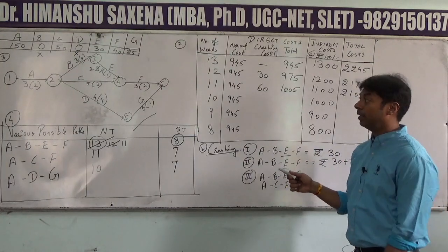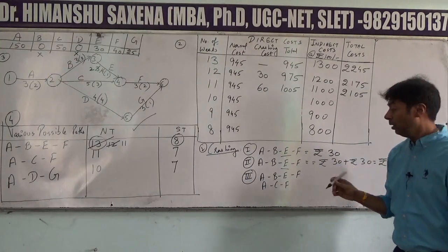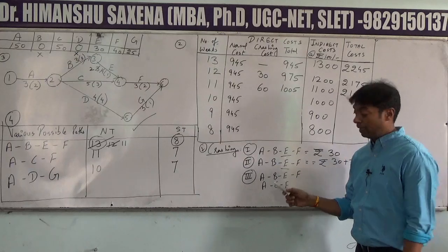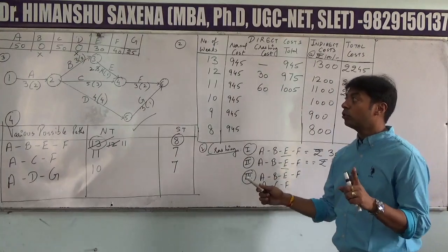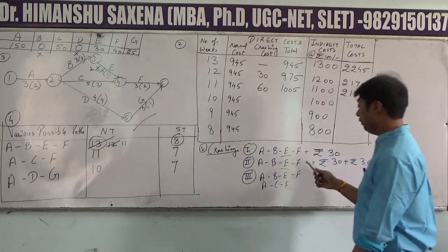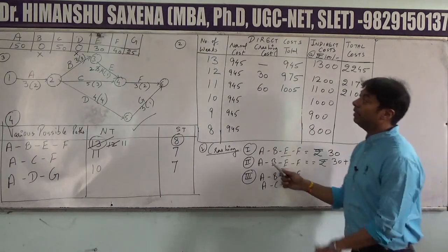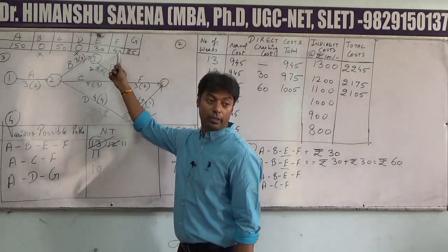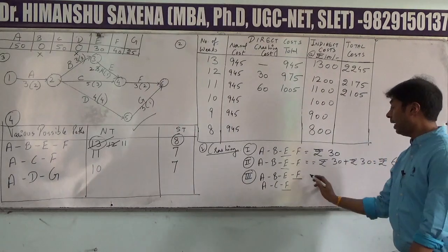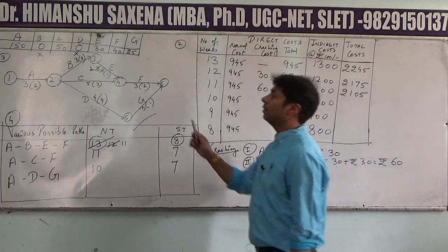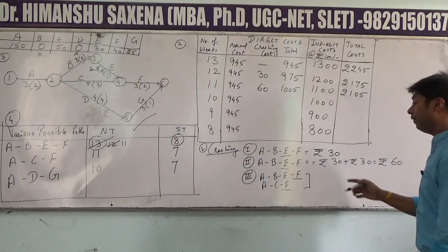Now one activity can be selected from each path by taking either a different activity from each path or taking an activity as common. So activity A is common in both these paths, but it has a cost of rupees 150. If you observe over here, activity F is also common, right? And the cost of reducing F is only 40 rupees. So what do we do? We will select activity F. Why F? Because the cost of activity F is quite less than the cost of activity A. So activity F is common.